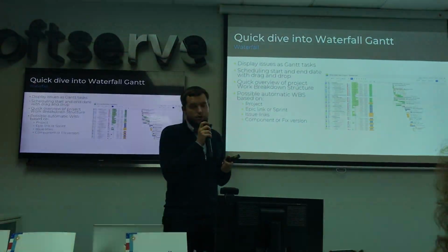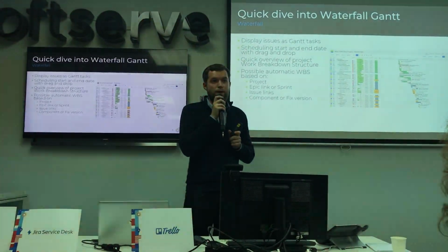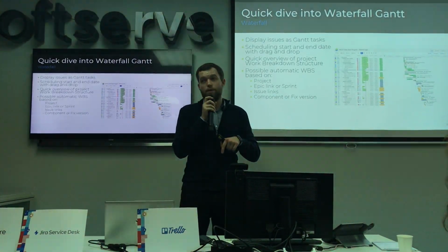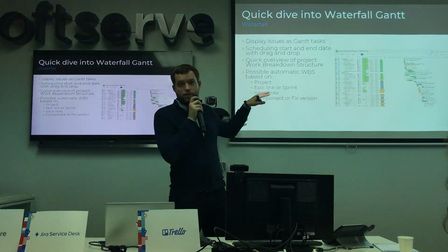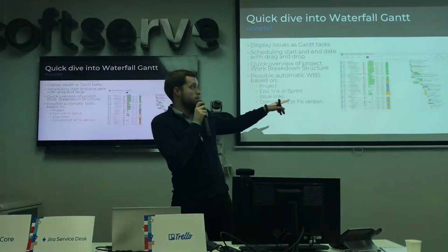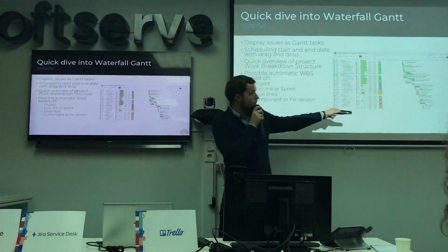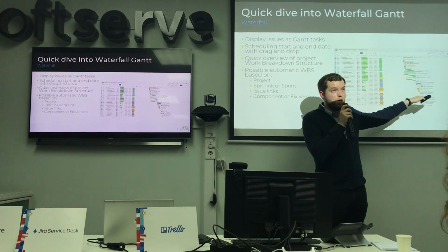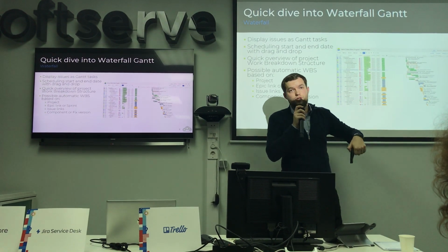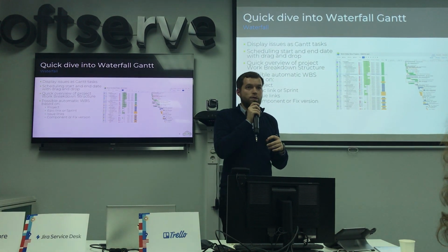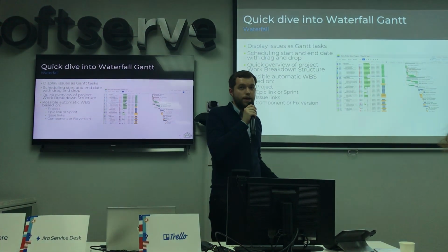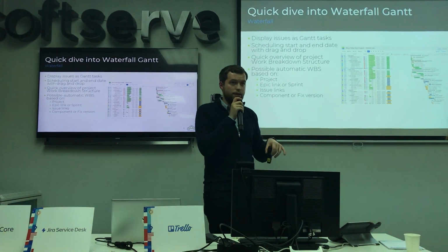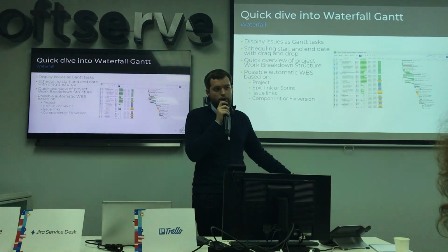And what I would say the most interesting thing about BigPicture Gantt is that you can change the state and properties of your tasks in JIRA right from your Gantt. I mean, it's just a kind of drag and drop tool. You can move your task through this plane, and while you're changing the position, you will change the dates inside of your JIRA tasks. So you can even make some adjustments onto your project planning with your tasks through this plugin instead of changing your dates inside of each task in JIRA created.